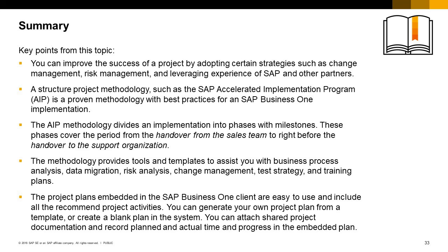Project realization: the heart of the project where the company is configured to match the business blueprint. Testing also takes place. Final preparation: the focus is on preparing for go-live. The go-live date is set, the users are trained, and the final balance is transferred over. Go-live and support: after go-live the customer moves into support mode.